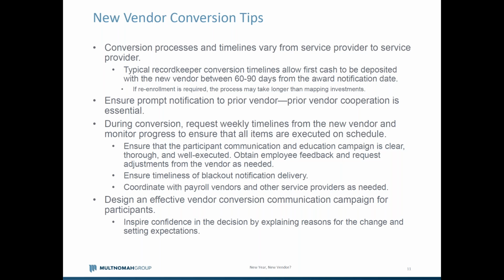And the approach and process that they have can also vary. So during the search, I think it's important to ask for a sample project timeline for the conversion, based on your deadlines and targeted implementation date, as well as what that process looks like. Usually it takes 60 to 90 days. 60 is pretty aggressive from a timing perspective. 90 is pretty standard, and in some cases we can see that extended out to 120 days or even longer. It depends on the quality of the incumbent, as well as how you want to communicate these changes to participants before making a change.